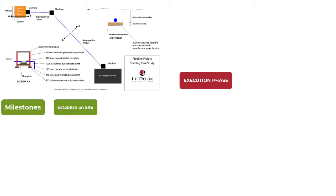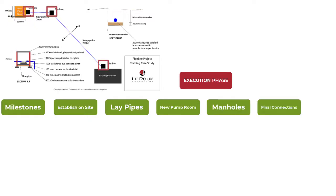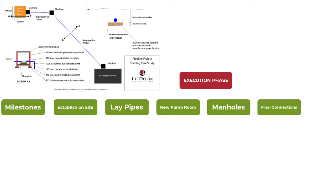Then on the second level, I've decided to divide my work packages into six main components. On level two, we're going to have milestone dates, I'm going to establish on site, I'm going to have a lay pipe section, I'm going to have the new pump room as a separate package, the install manholes, and then also the final connections and commissioning. In this case, for instance, my install manholes could have been part of just that laying pipe section. I've decided to put them on level two, because in this case, it's going to be a subcontractor that's going to execute them. So having it on a separate level, it just makes my management of that a bit easier. It isolates it for that subcontractor. So you can see it's a practical consideration, it's preference, but if you would like to place that component below laying of pipes, that would also be correct. Nothing wrong with that.